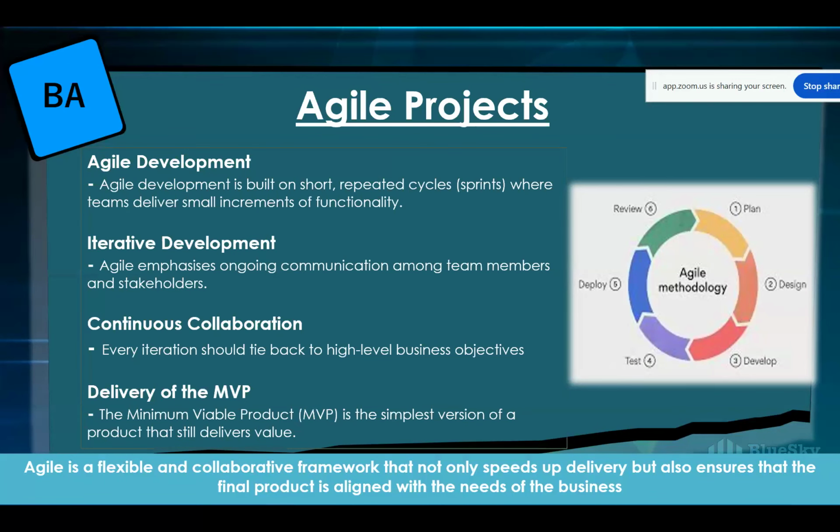Agile development of projects is managed using short sprints. I'm sure you've heard of this before, so I won't dwell on it. We call them sprints. They vary; the most popular length is 2 weeks, but it can be a week or 4 weeks. Most sprints are 2 weeks.